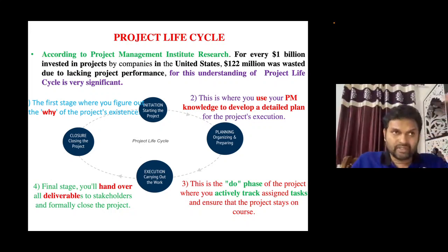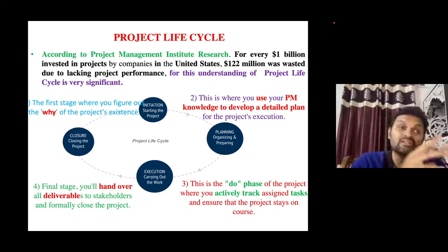But in the upcoming 5 to 8, 10 years, my company wants to go for road construction. Definitely if we bid at the start, no one is going to entertain us. So how do I make sure my company will be entertained in the category of road construction, because we have enriched experience in real estate? First we will work as a third contractor or a part-side contractor, then we will try to have a joint venture with some of the players. After getting the exposure and experience, we will try to go solo with road projects.